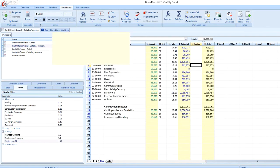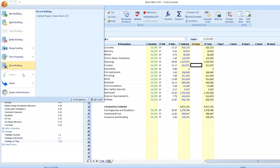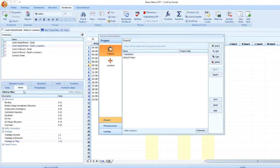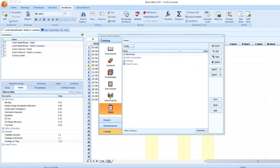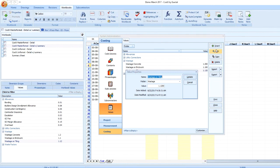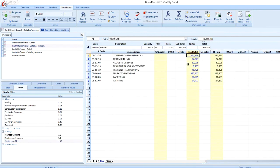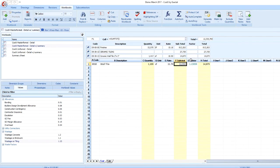I can change these values by going into System Administration, Values, and editing them from the Edit window. Once updated, the values will automatically update in every place that they have been linked. In this example, I changed the Tile Waste Factor from 12% to 15%, and it has been updated where it was applied to the floor tile and the wall tile in the estimate.